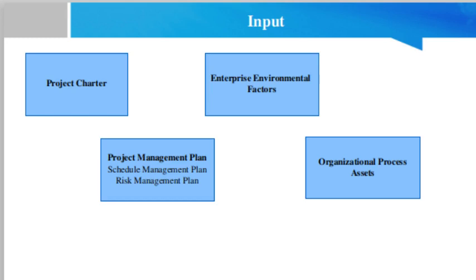Enterprise environmental factors that can influence the Plan Cost Management process include: organizational culture and structure, which can influence cost management; market conditions, which describe what products, services, and results are available in the regional and global market; currency exchange rates for project costs sourced from more than one country; published commercial information such as resource cost rate information from commercial databases that track skills, human resource costs, and standard costs for material and equipment; project management information systems; and productivity differences in different parts of the world, which can have a large influence on project cost.